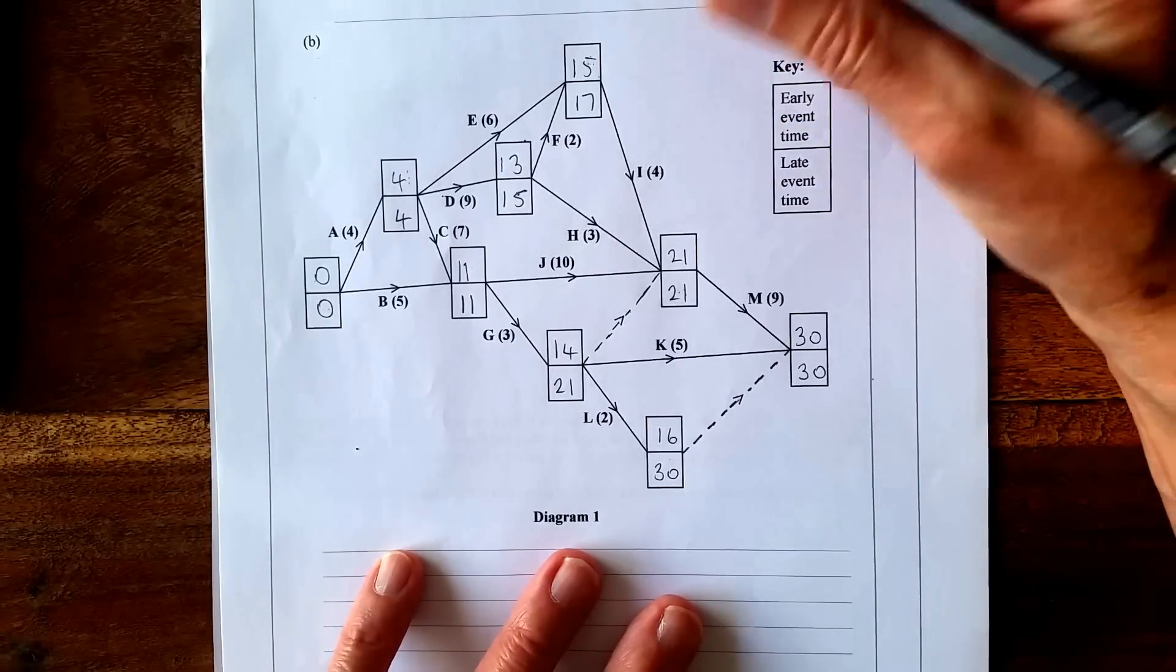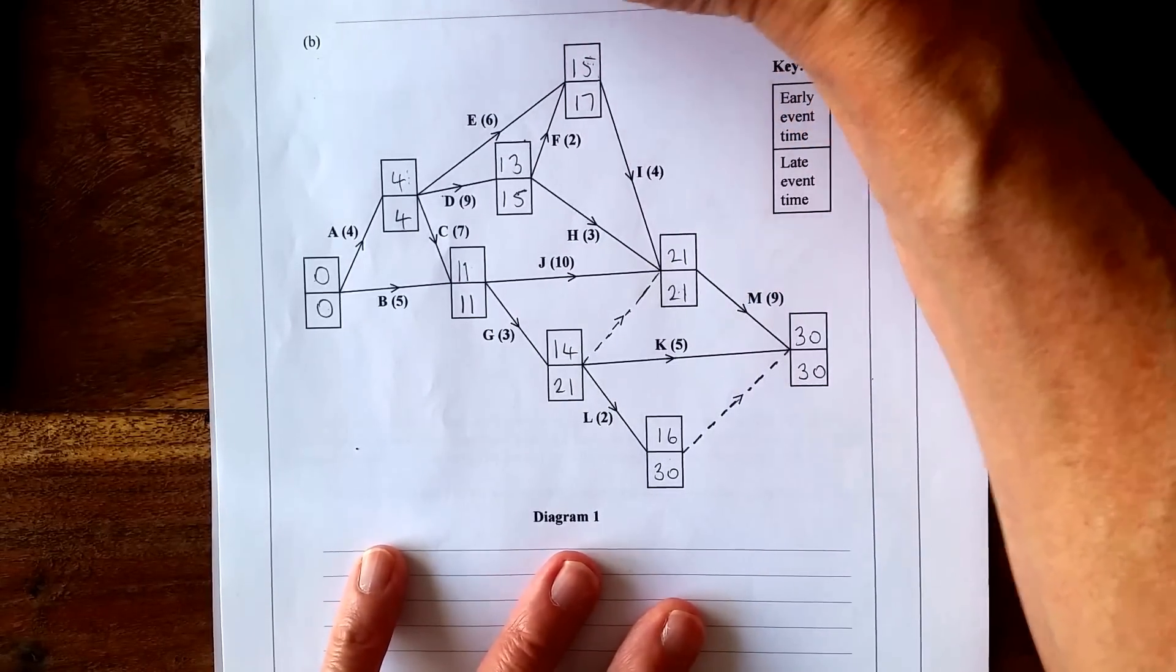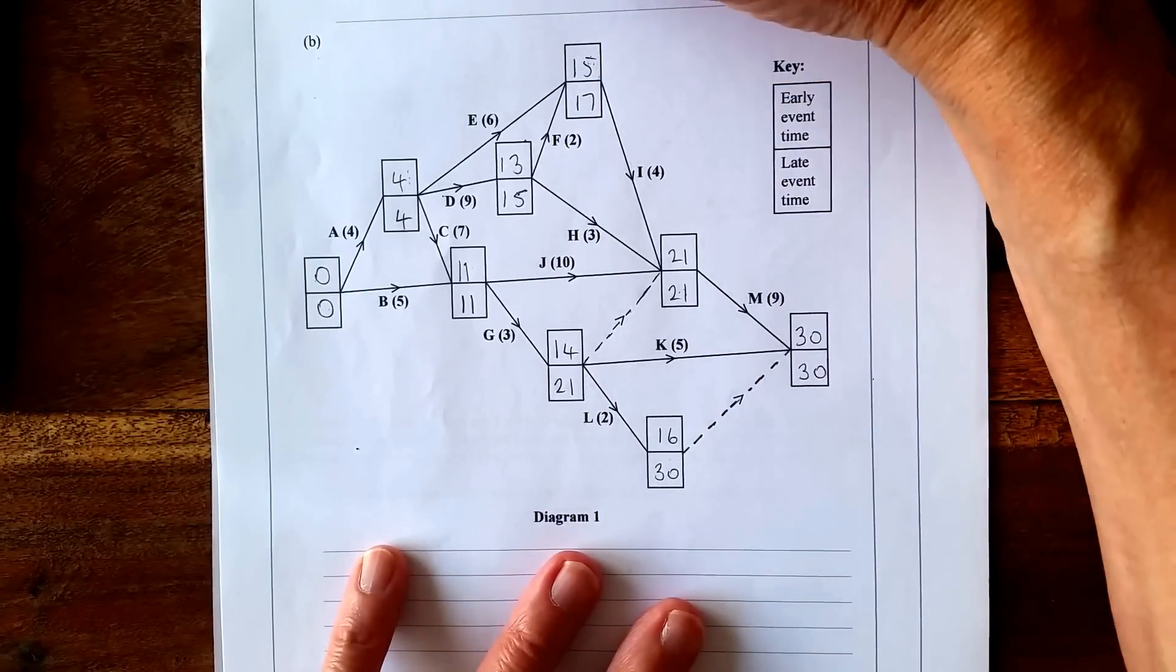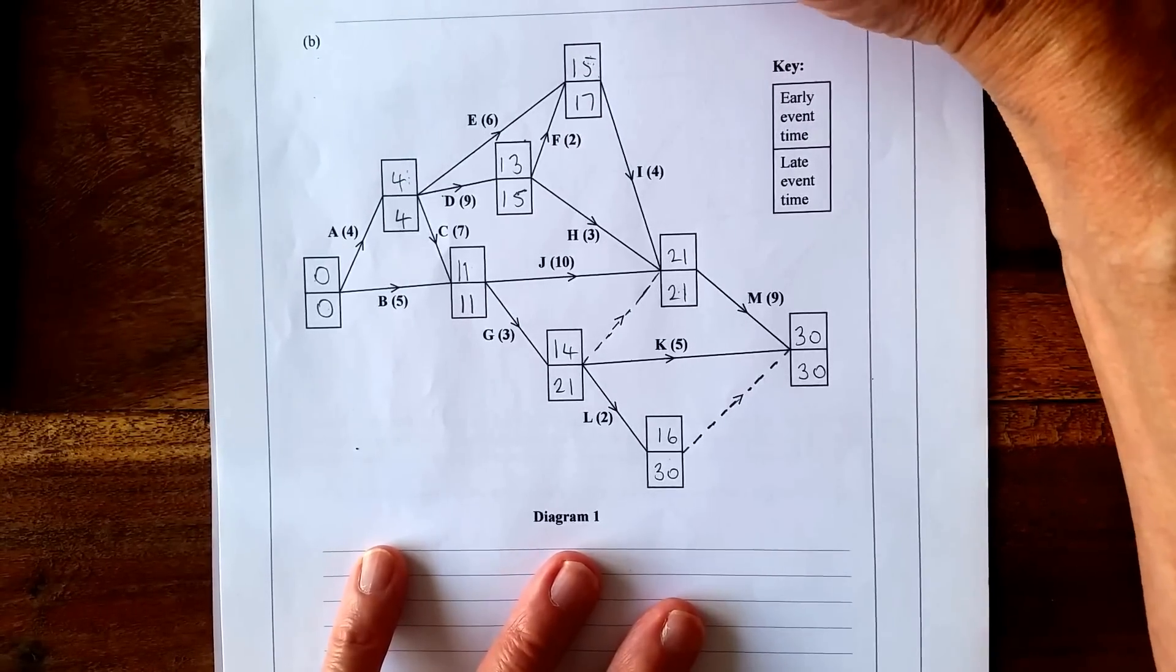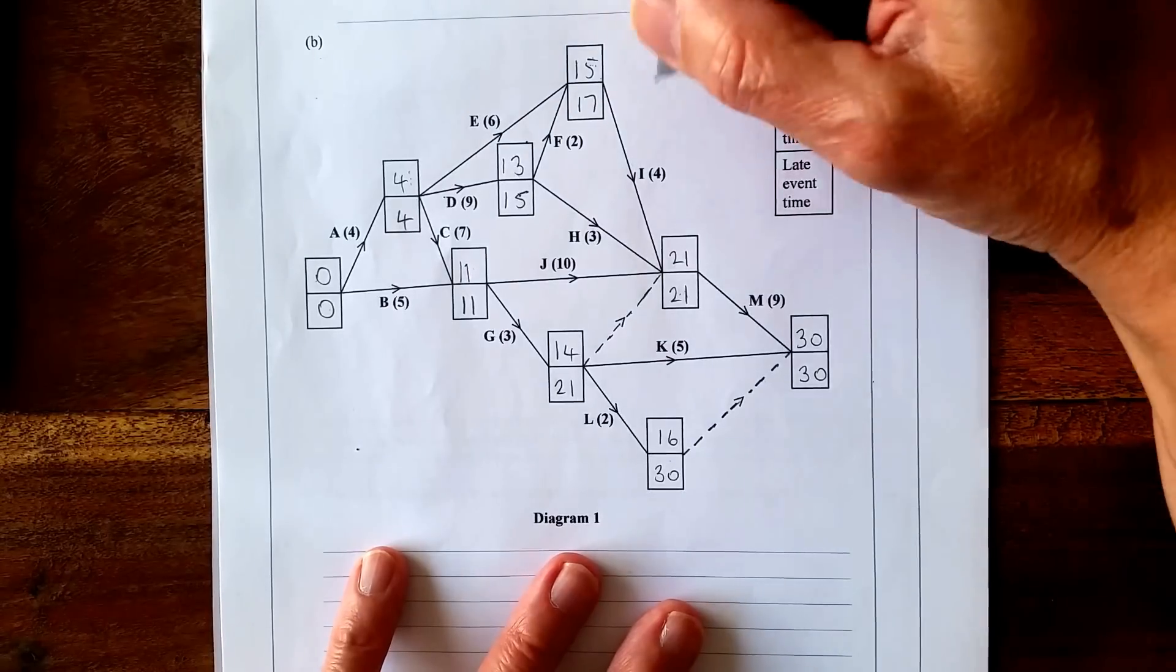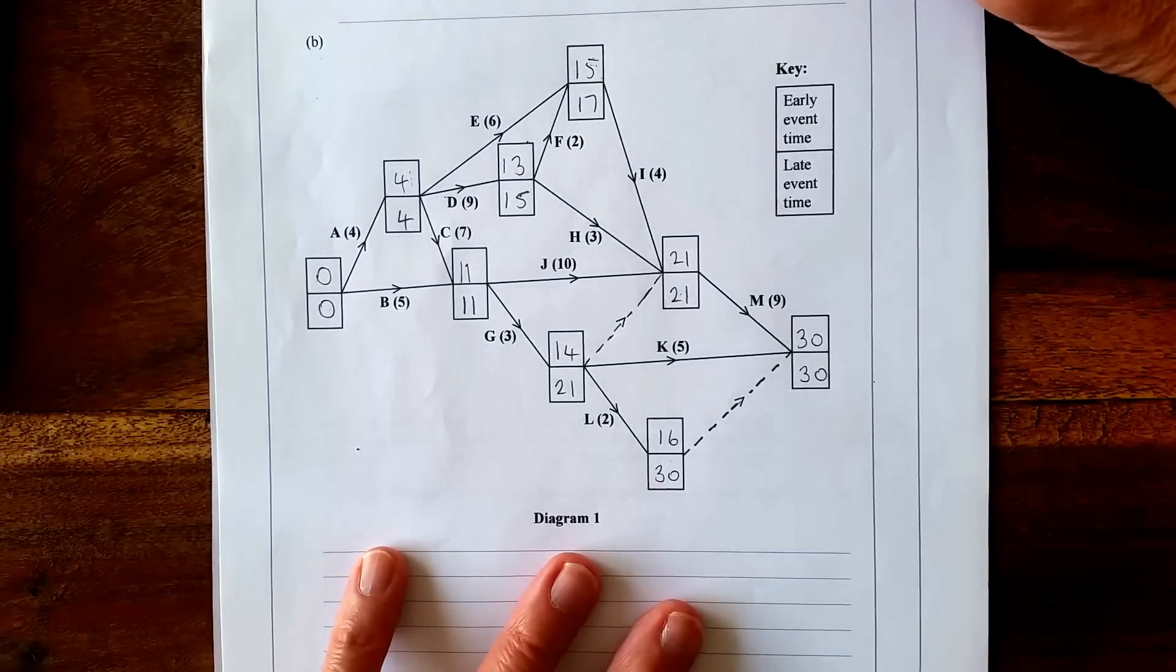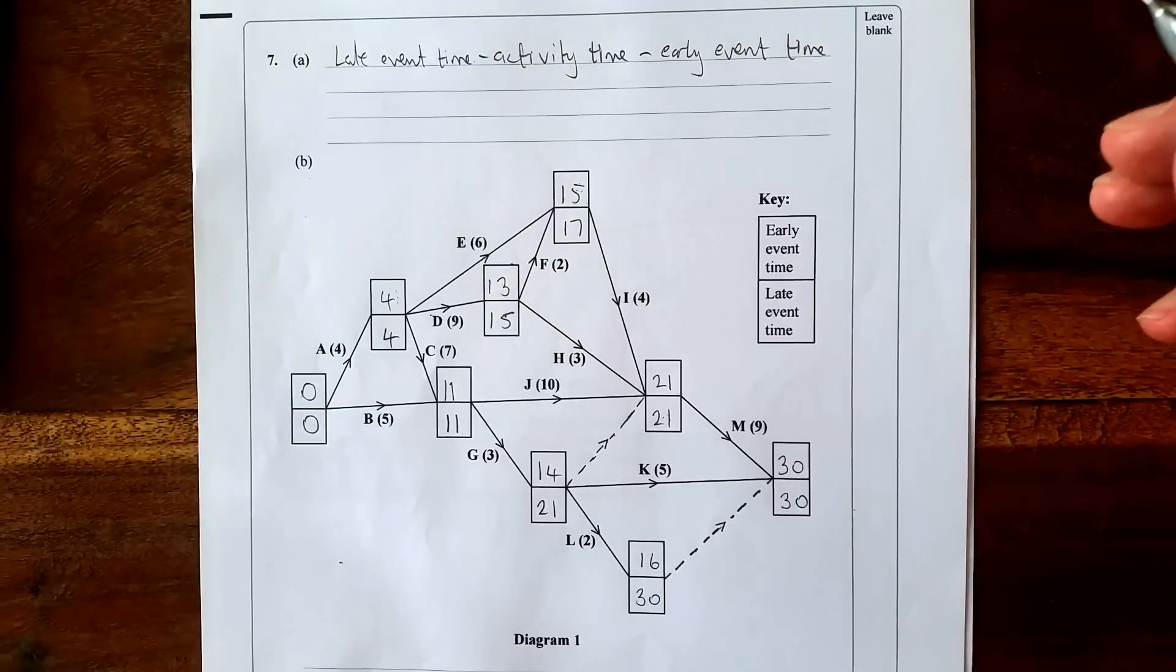But in general terms, it is late event time minus the activity time minus the early event time. And that's part A and B done.